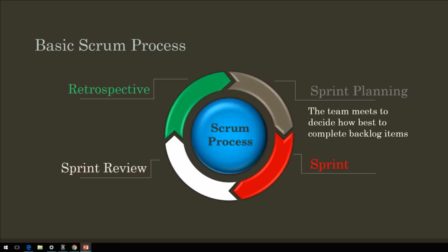During sprint planning, the team meets with the product owner to figure out, how can we achieve the most features that you want to get out of this sprint? We may or may not be able to achieve everything, but what are the most important things? And then how long is it going to take us to do all these things? How realistic is it for us to finish in the 2 weeks or the 3 or 4 weeks that we've set aside? So you're basically planning the project.